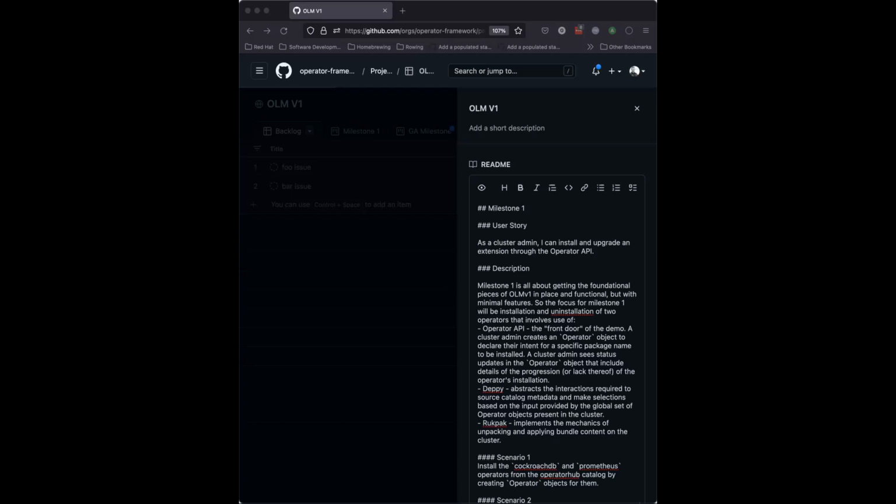Yeah, I think part of it though is having enough of these issues in the backlog aligned to the next immediate milestone or two, such that we can pick them up and those are the priority things to work on, versus, oh yeah, this issue is related to functional requirement number 10 and we haven't talked about working on that.